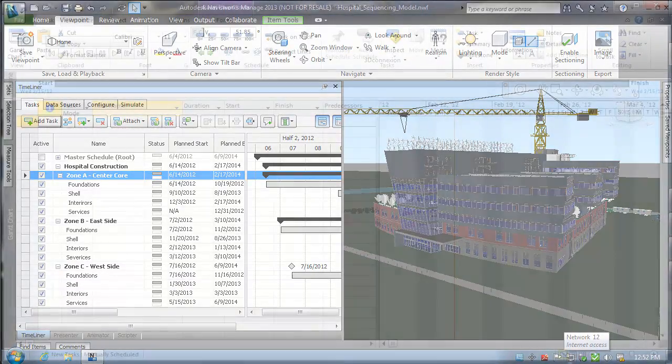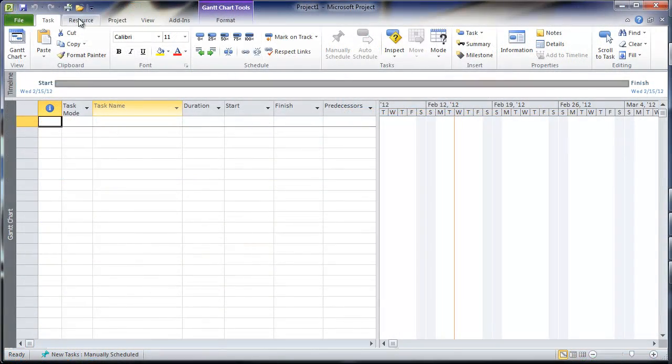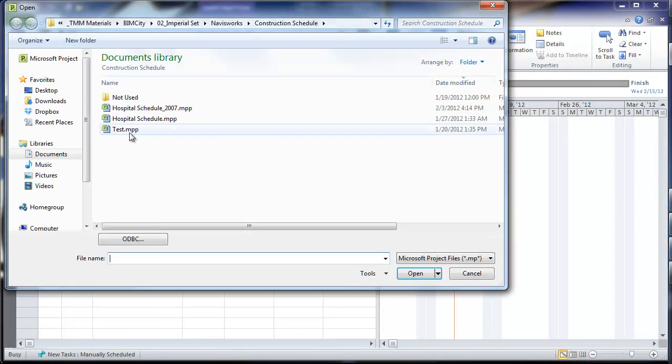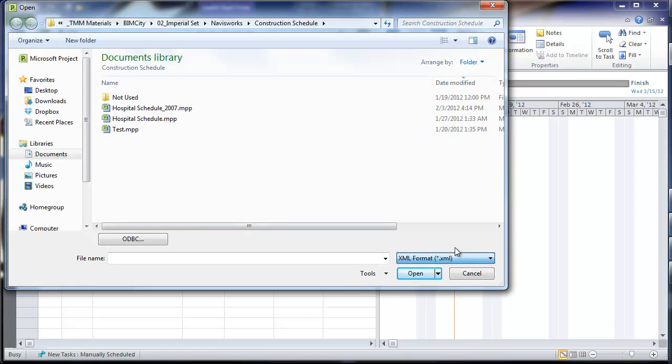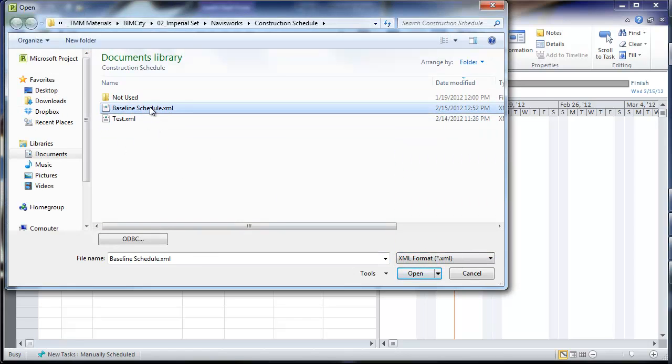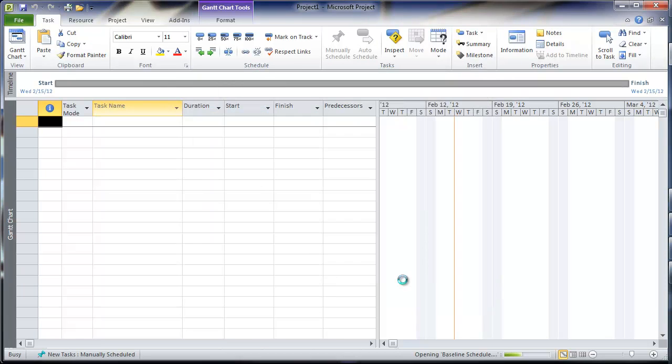We see here our schedule that was created in Navisworks being imported into Microsoft Project 2010 for refinement and to add the detailed work breakdowns for each category.